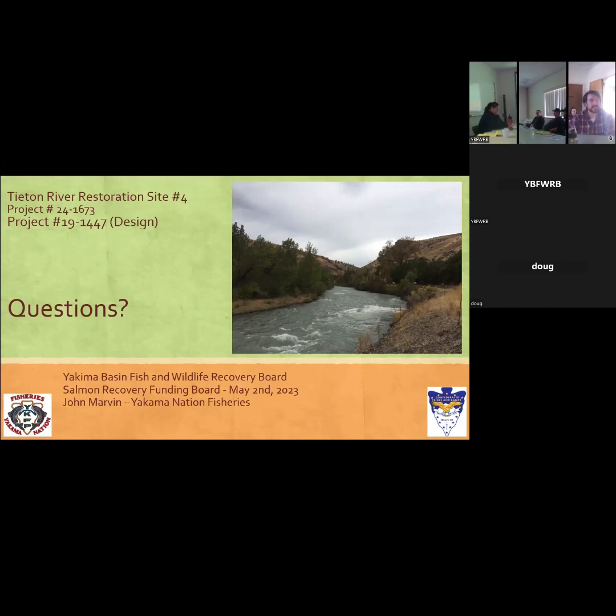The cardboard bridge is going to be the access. Is that during the construction or year round? No, I was just orienting people to the location. We're not using the plywood. We're using that parking lot, and then they're going to build a temporary bridge. If you build a permanent bridge, that costs you an extra 200,000. We don't want a permanent bridge. That's more permitting, and we don't want to maintain it. But there's no reason. It gets you into targeted.